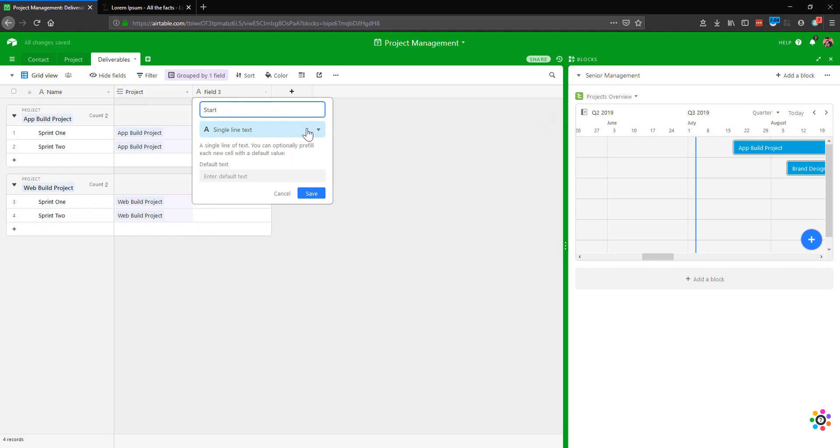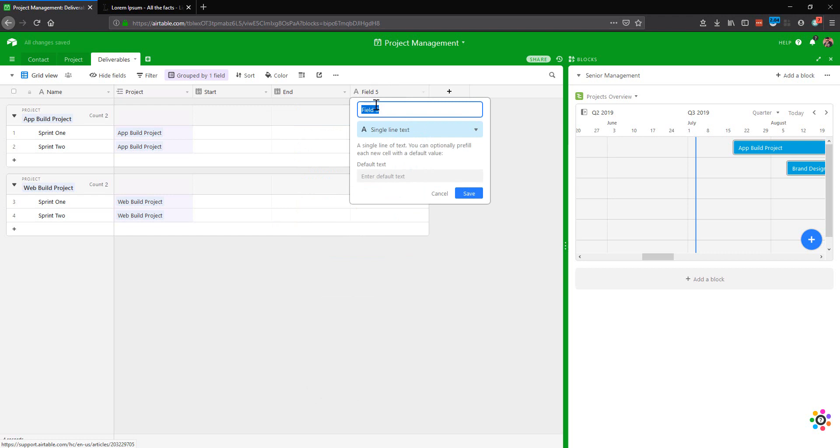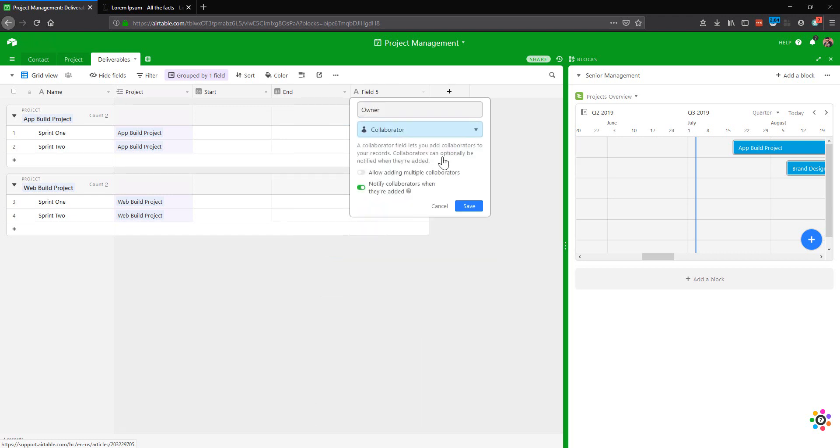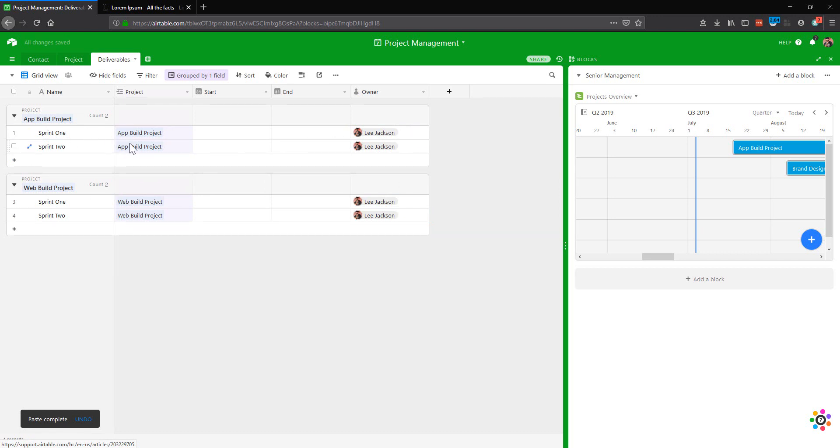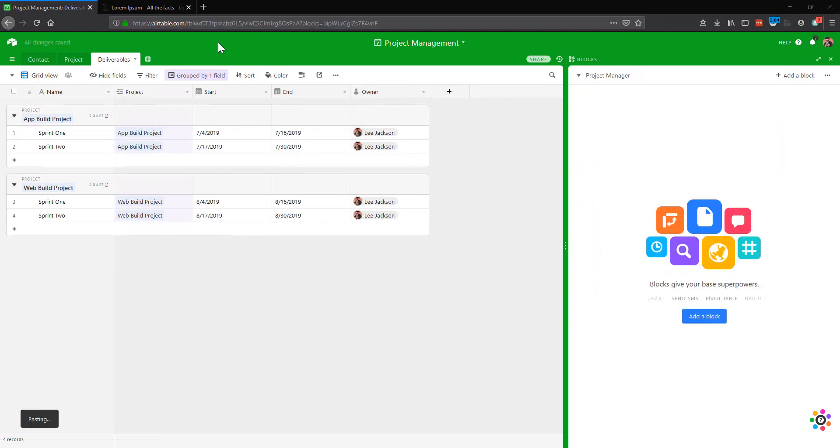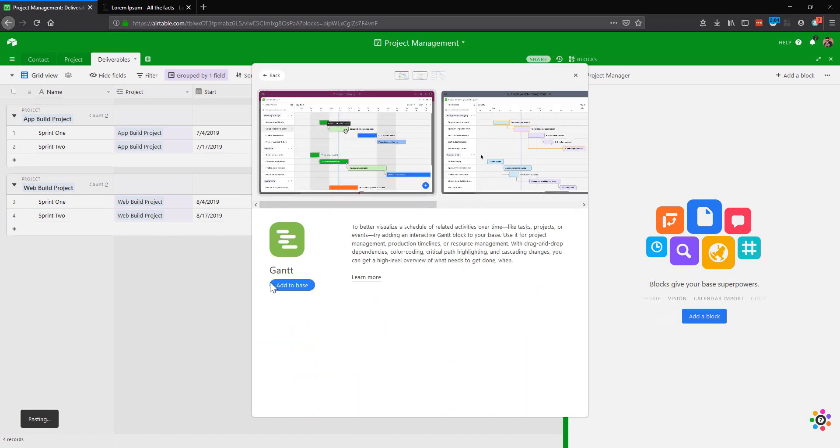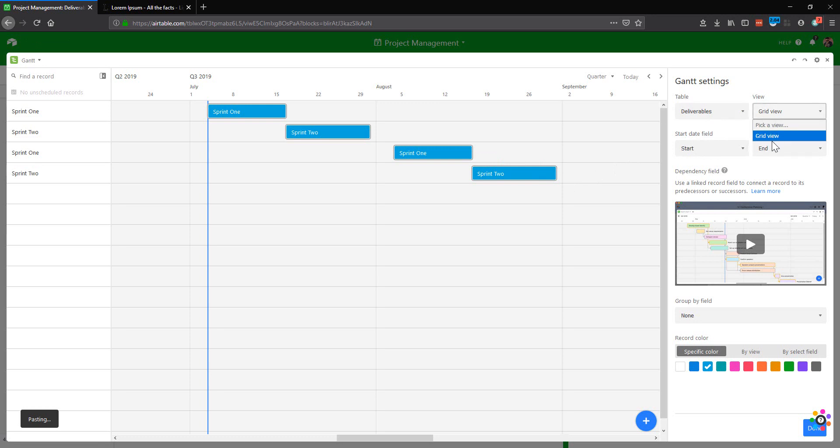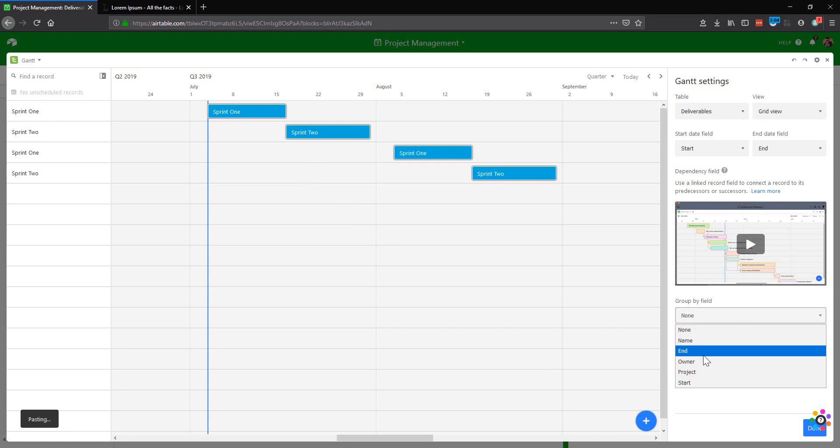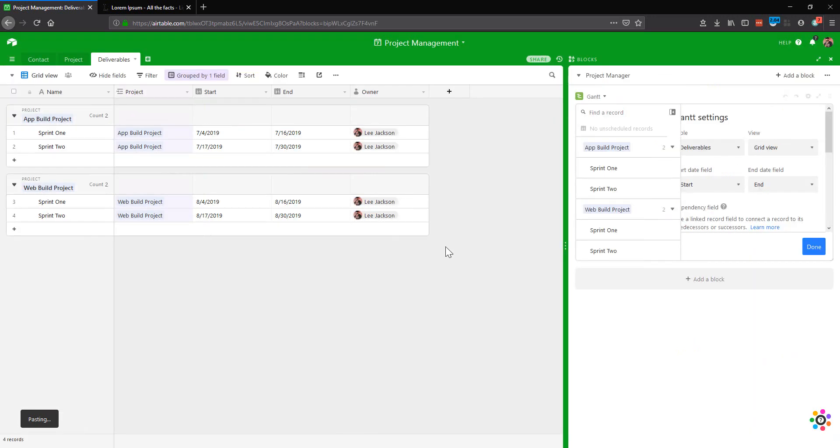Let's build up the data here. So we're going to have a start date, we're going to have an end date or due, whatever you want to call it. We could have an owner as well, especially if this is something that you're going to be doing internally. So let's add a collaborator and we can notify them when they're assigned something. For example, I could assign this to me or to Larissa or to anyone in the team. So let's assign all these as the project manager. Let's put in just some example start dates. I'm going to add into a new dashboard area called project manager another Gantt chart, which is going to give me an overview of these deliverables so I can see where I am with the deliverables. So I see sprint one, sprint two, sprint one and sprint two. And we can also select different views, so you can actually create multiple views. You could create a view of each project and then have a specific Gantt chart for that project so that you can show that to the client. I'm actually going to group these by the project so that I can actually see all of my projects on one screen, which is super helpful.